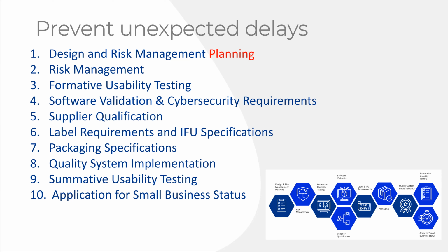The reason why? You're going to have to do summative usability testing, and you should be developing the instructions for use during the formative testing. And so that way you go into the summative testing with your finalized instructions for use. One of the purposes of doing that formative testing is to help develop those instructions for use and debug them.